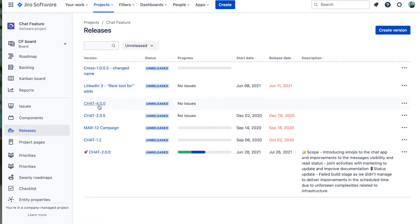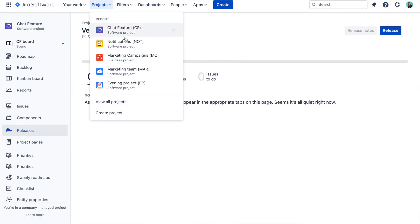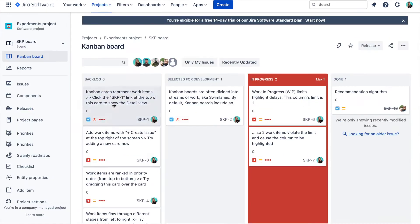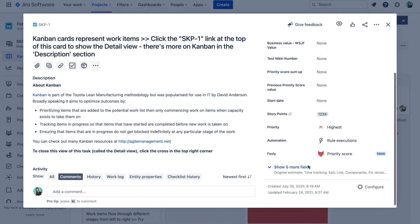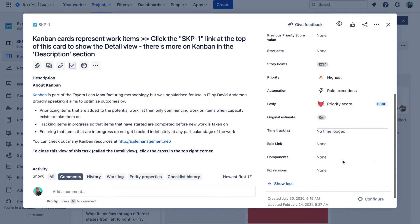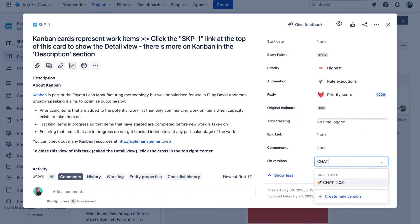Now there is a catch. You cannot link a release that belongs to one project to an issue from another one. Usually with smaller projects, it's not an issue because you can manage all your work in one project.